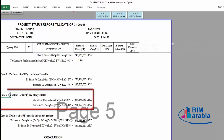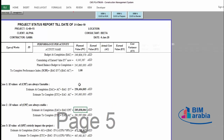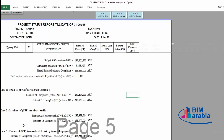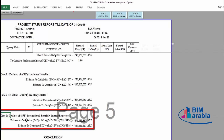Case 2: if the CPI is always stable — the same performance index for cost every month — you consider the CPI in the calculation. The equation is: EAC = Budget at Completion ÷ CPI. In our case, because we have a very low CPI, the cost will be approximately 285 million instead of 249 million — a big variance. Case 3: if the SPI is considered to strictly impact the project, the equation is: EAC = Actual Cost + (Budget at Completion − Earned Value) ÷ (CPI × SPI). With our very low SPI and CPI, the EAC becomes 472 million instead of 249 million.